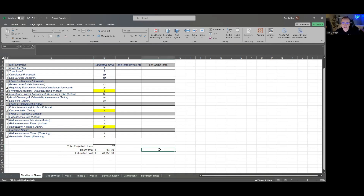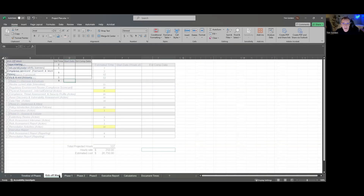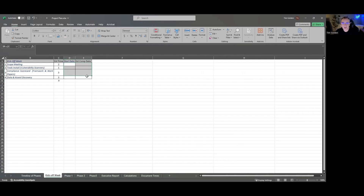Using this calculator, you start off with the kickoff week — like when do things start, how much time you think you're going to spend in a scoping meeting, basically installing tools if they don't exist, building out your framework, and then doing some data discovery and asset discovery in that kickoff week.